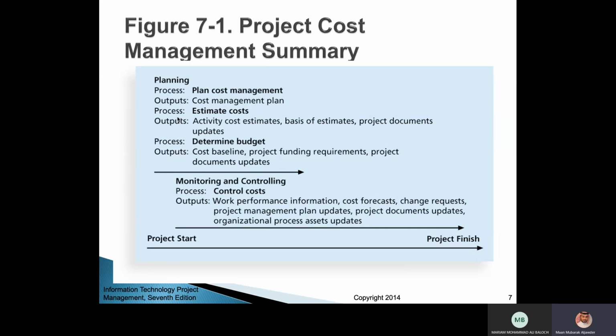And we mentioned earlier that there's the CCB group. They will look into all the change requests, and then either they will approve it or they will reject it. If they are approved, then you need to ensure that you implemented these approved changes, and document them in a proper log. If they are rejected, then you don't do these changes and you try some other solutions.